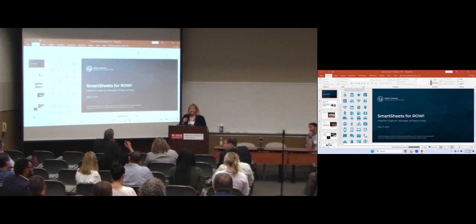Great presentation. Quick question. We have some projects that are going to restart. The last right-of-way estimates were done in 2020 or 2021, and nothing has changed in terms of design or impact. Is the turnaround time on the estimates sooner than a new project? It should just be an update, right? If nothing has changed, you would still send it in, but when it's assigned, it should be more like, have the land values increased in the past two years? So it should be less time than normal, but we don't specifically say it's going to take this amount of time.